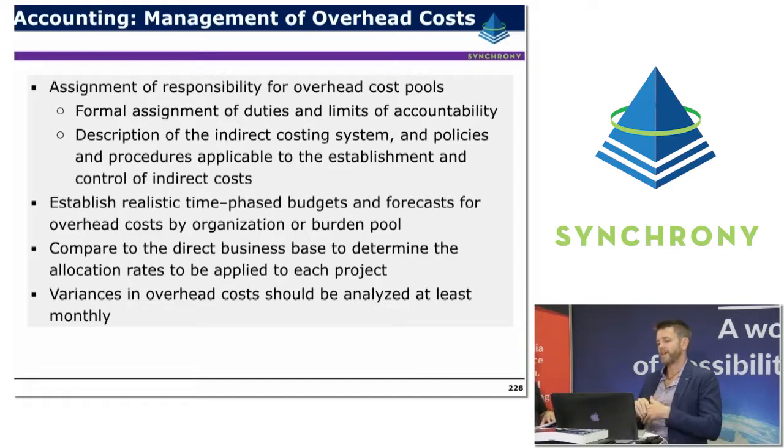So the more you can have that clear distinction of exactly which costs are being treated as this overhead pool, and as much as possible that can be the same method that's used in the estimate, the same method that's used to allocate the budget, and then for that to actually be the reality of the way that actual costs are being allocated to the project is a really important factor. And if you don't have that, it can really mess up the system a little bit and reduce the amount of value you get from it.